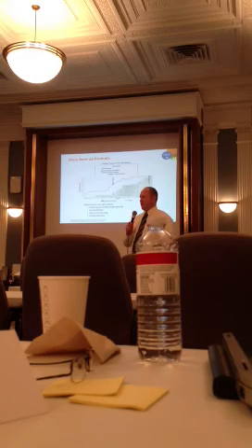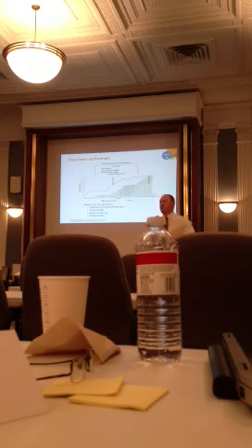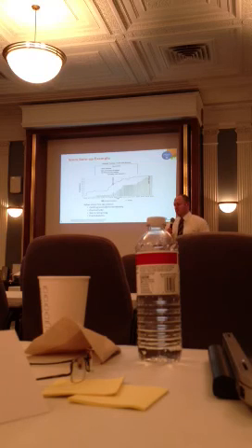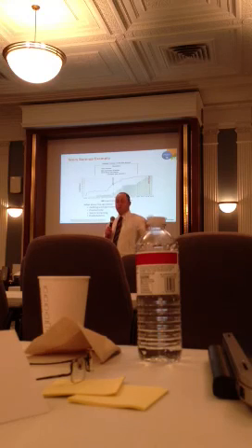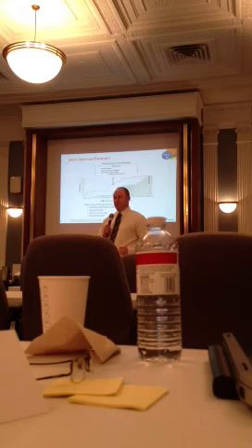That's really the only time I've ever seen where something would get unaccepted: if the product owner and the product owner delegate are not on the same page. Otherwise, if there's a scope change, something new, or a defect, we're going to track that through either a new user story that may or may not have story points, but it's not going to result in something getting unaccepted.